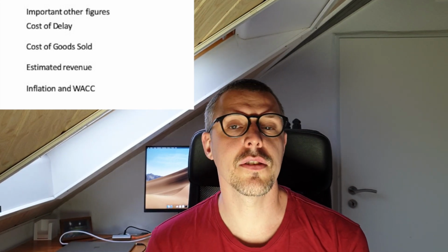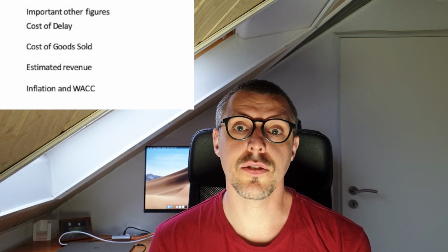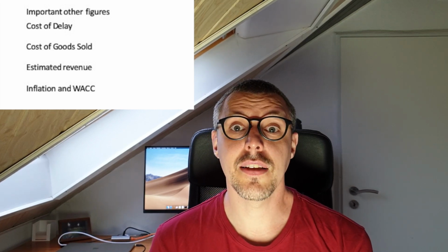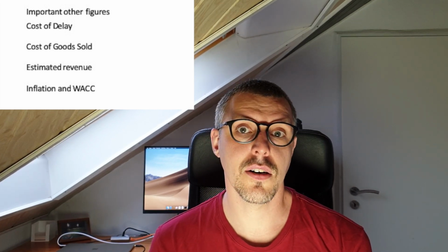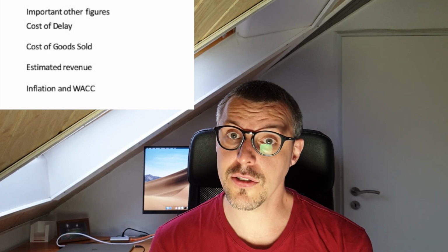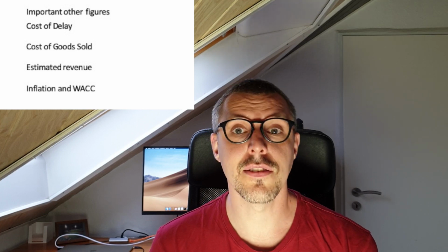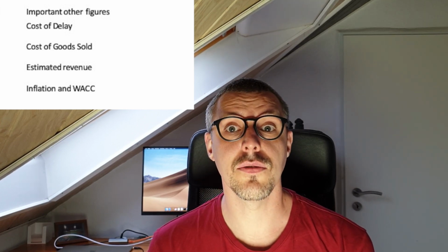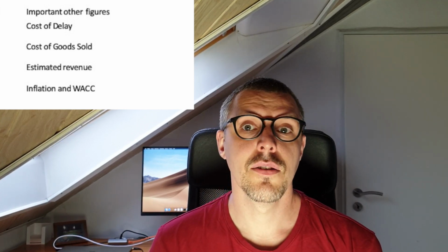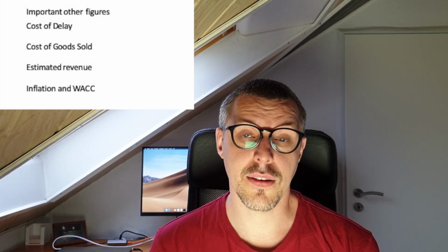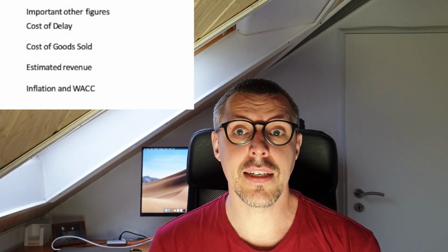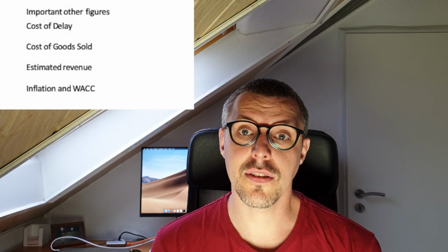How much does it cost if we spend 1 sprint longer or 2 sprints longer? And this cost is not only the cost of work, the labor costs, it's also the cost of not selling the product. It's the cost that you have if a competitor comes faster to the market than you do. All of these add up, and it is much more than just the labor cost.